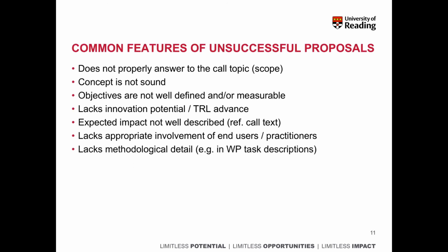Proposals often lack methodological detail. You'd be surprised how many work package descriptions I've seen where there's very limited text, sometimes one line for a work package. So you see a task where there's 20 person months, but one or two lines of description of what the task will do is not sufficient. There has to be enough attention paid to describing basically what will be done and how.